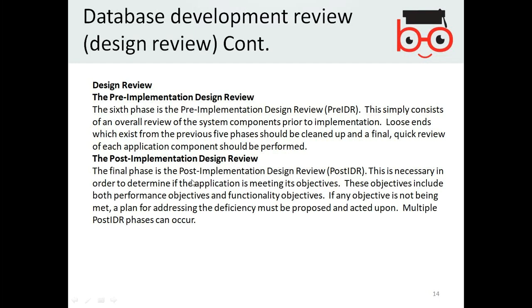Post-implementation, final test. This is necessary in order to determine if the application is meeting its overall objectives. So post-implementation is to check whether it is meeting the overall objectives or not. These objectives include both performance objectives and functionality objectives. How it is performing, whether it is giving functionality or not. If any objective is not being met, a plan for addressing the deficiency must be proposed and acted upon.